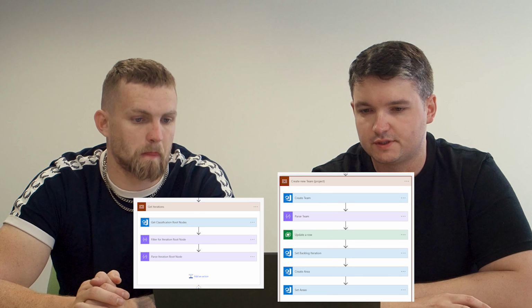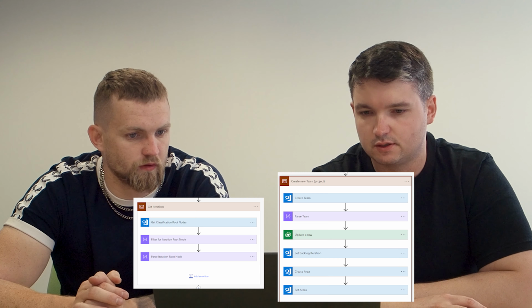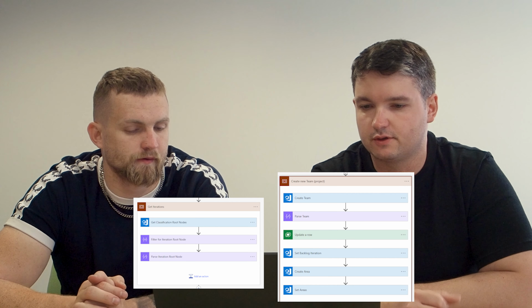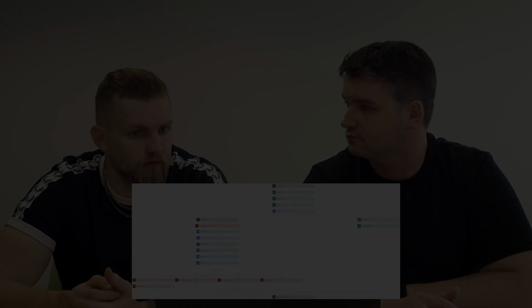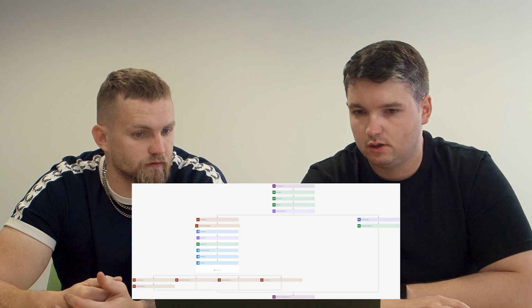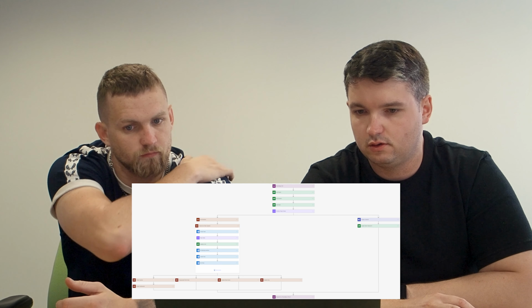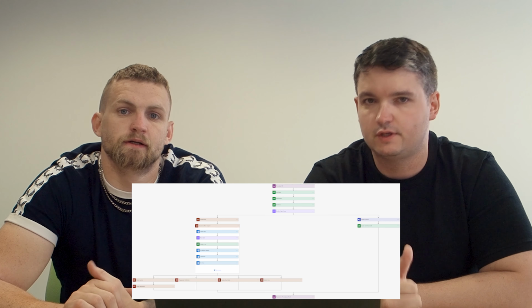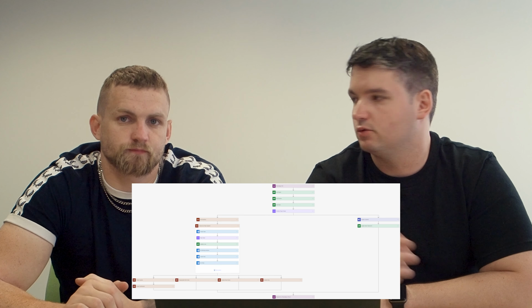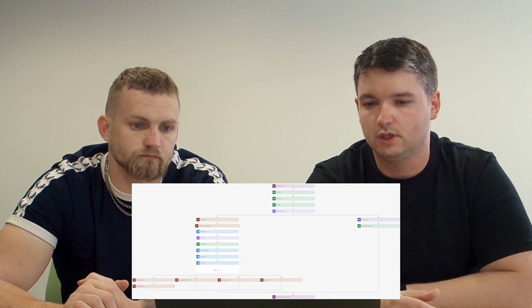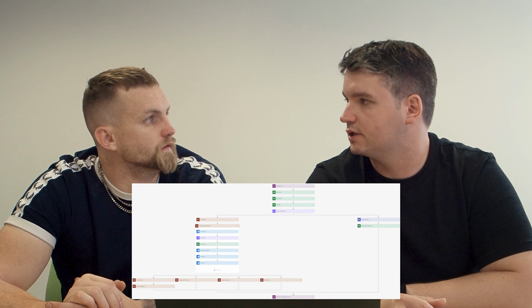Yeah, so with the standard DevOps connector, you're basically connecting to the API. Perfect. So therefore you just use your URL. It's creating all the iterations, it's creating a team, and then it's going to actually populate any work items, or does it? So it goes in, creates the default iteration, because then your project manager will go in, create the iterations, and your business analysts or devs will then create your requirements.